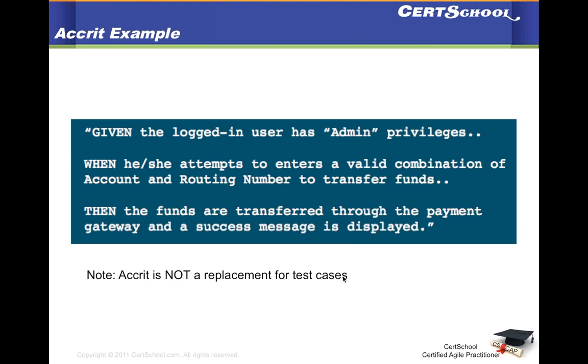Okay, let's look at an example. Using the same template, start with the first part. Given the logged in user has admin privileges, when he or she attempts to enter a valid combination of account and routing number to transfer funds, then the funds are transferred through the payment gateway and a success message is displayed.